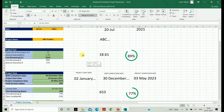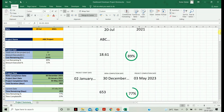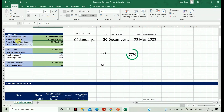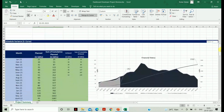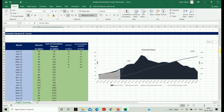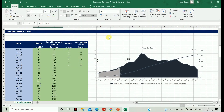Let's see what sections are in the Excel sheet. First: date and project name. Then you need to give input about the project cost, the project timeline, the RERA completion date, start date, and completion date. The rest of the data will be reflected automatically. The next part is the Schedule Variance — an S-curve is formed from this data.